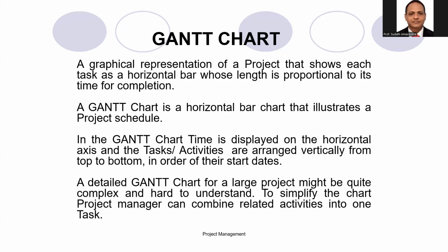The first thing is to make the plan. Assume it takes 2 weeks, then we can draw a horizontal bar for the 2-week period. Then after the plan, we go with the foundation, the second task. From the second week, we draw another bar. Assume we require 3 weeks to complete the foundation. Likewise, we build the Gantt chart. I'll give the image later.